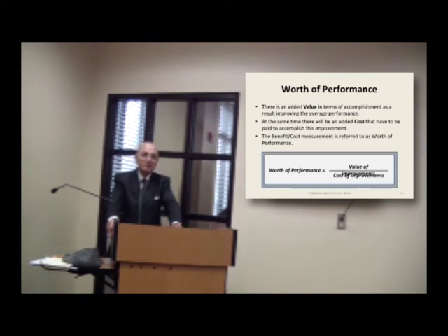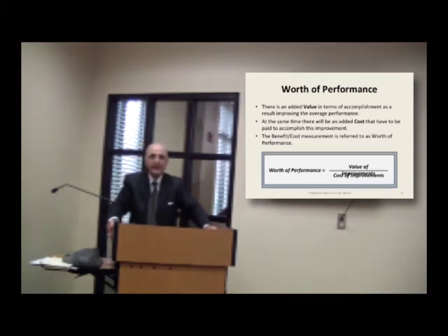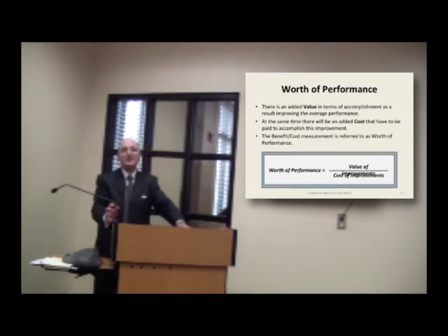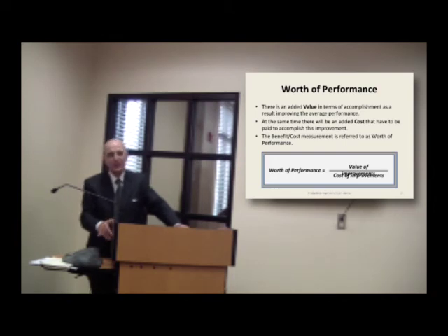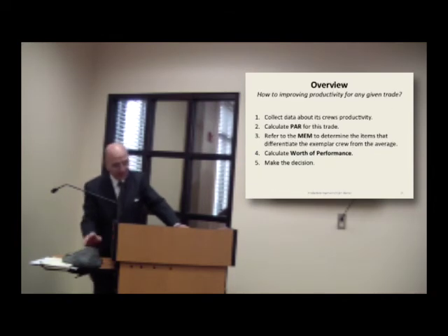The productivity improvement will yield $100, but it will cost you $150. Don't do it. You are not seeking productivity improvement for its own sake. Okay? You have to make a worth of performance decision. Is it worth it or not? That's your decision. Okay?